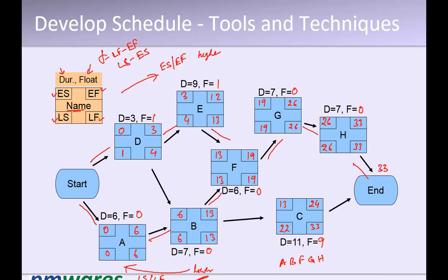And this total float is normally available on the branch. So this branch, this side, this path, it is shareable float. So total float is normally shareable on the particular branch. Now what is this? This contains a lot of float. That means C can be delayed up to 9 days without impacting the project end date. Is that good?